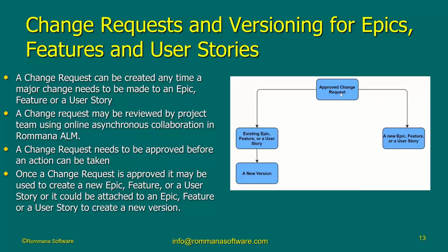Or the change is very different. It is actually a user story that stands alone in its own right. It's not really related to any existing user story. So that's fine. We take that change request and we create a new user story or feature or an epic based on that approved change request.